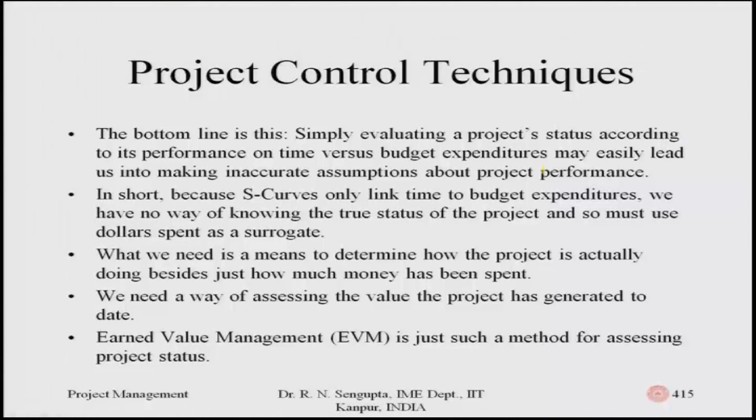Using S curves only links time to budget expenditure, so we have no way of knowing the true status of the project. We must use dollars spent on a daily or weekly basis, or per unit time, so that we can take collective decisions accordingly. What we need is a means to determine how the project is actually doing, besides how much money is being spent in an equal interval of time.